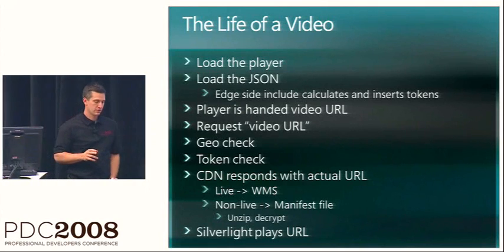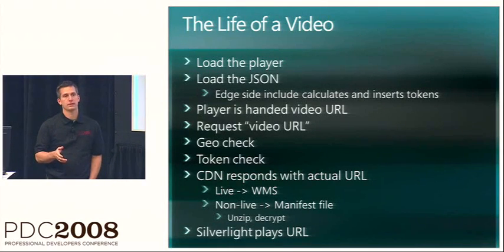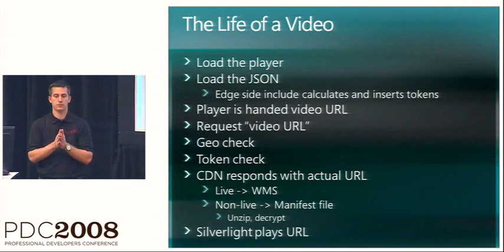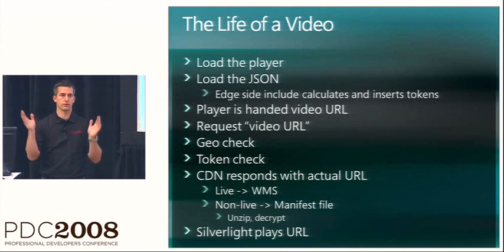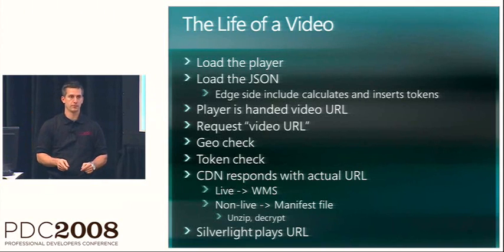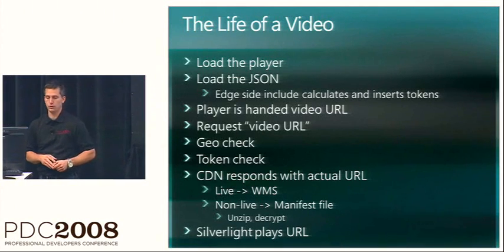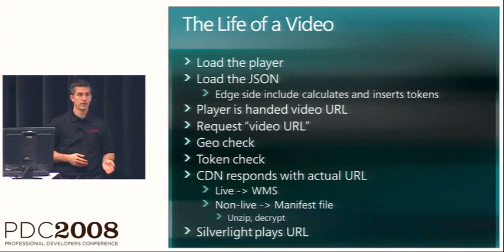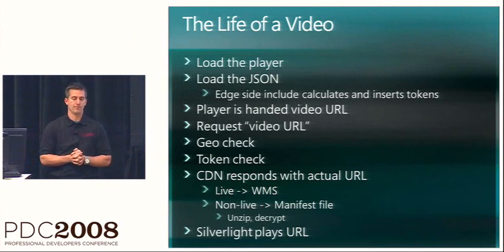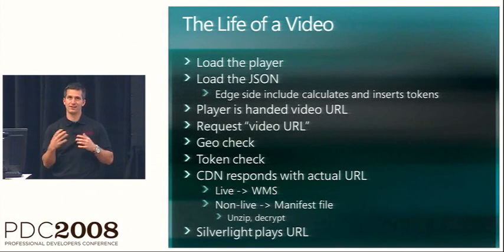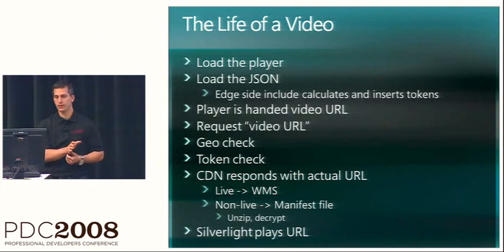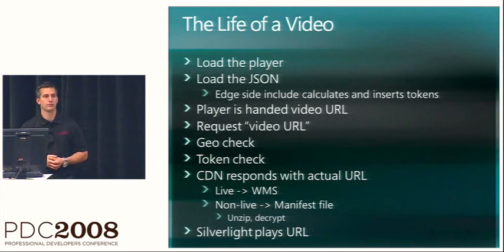So we did a couple things. One, we had a rifle shot test at the end of May, early June. We were doing scrumming before then, but the rifle shot test was where all the pieces come together, we turn everything on, we do it live on the web and see what happens. It was difficult before then because we didn't have all the systems set up to see if things were breaking. Once we hit that point, we went back and fixed a bunch of things. We did more and more live testing, and we kept doing that all the way up until we went live.